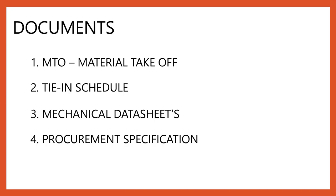The third important document is the mechanical data sheet. Data sheets are prepared for valves, strainers, and piping specialty items, and must be submitted along with the final submission. The fourth document is procurement specification — a specification used for the procurement of an item such as a valve, strainer, or any piping specialty item. Based on the requirements listed in the procurement specification, the items will be purchased.